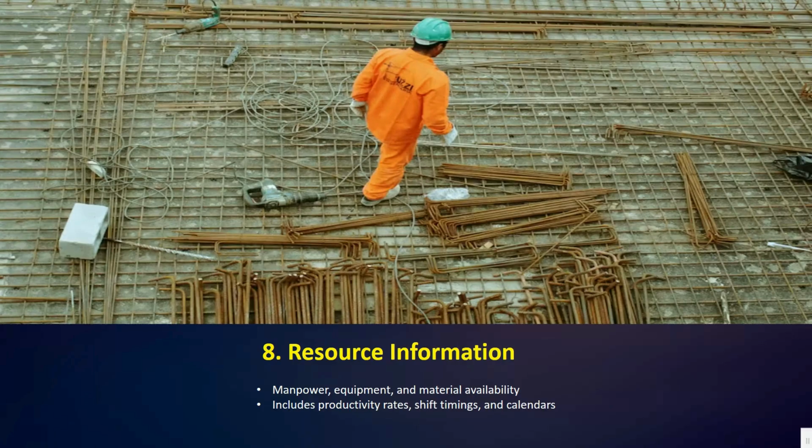So, resource information includes details about manpower, equipment, and material. We need to know the availability, productivity rates, shift timings, and calendars for resources. Only then can we prepare a realistic and achievable schedule, if we have all this information. So resource information is again very important.